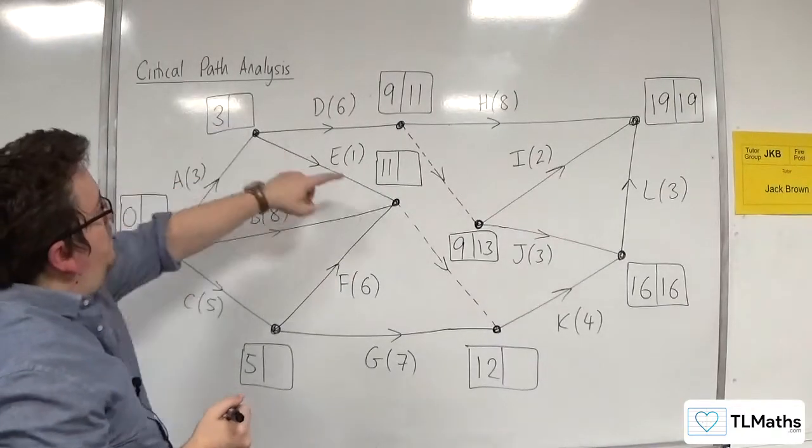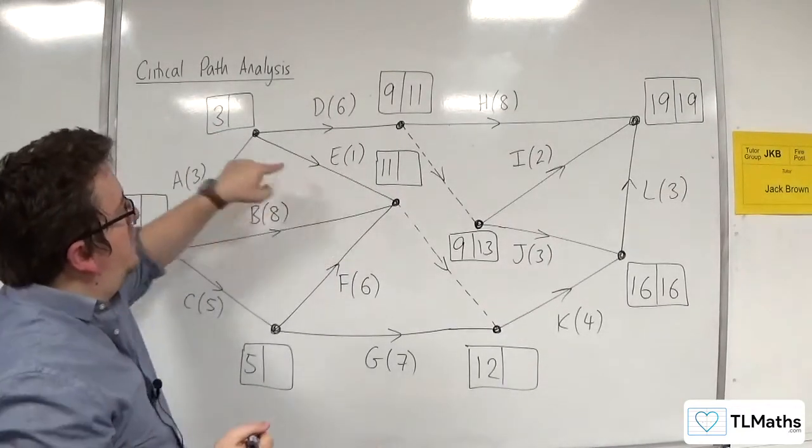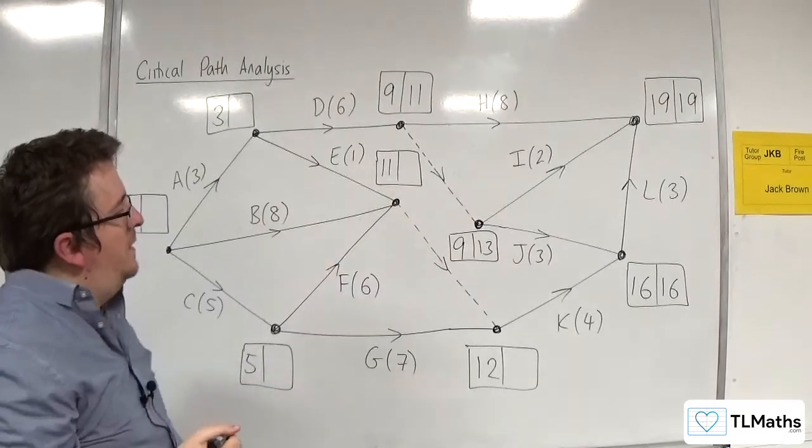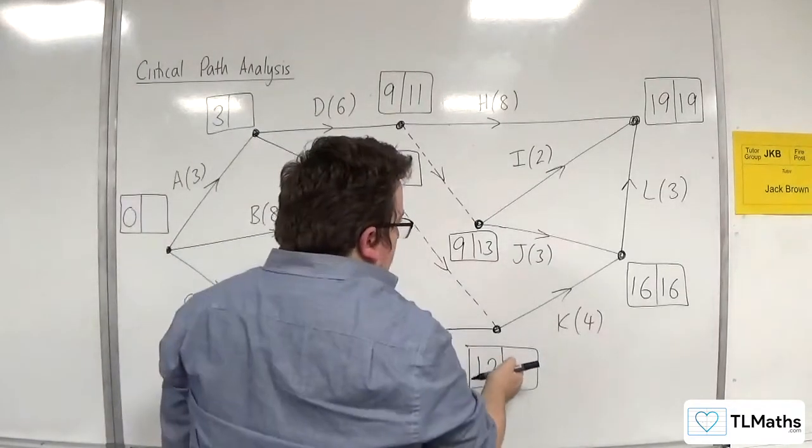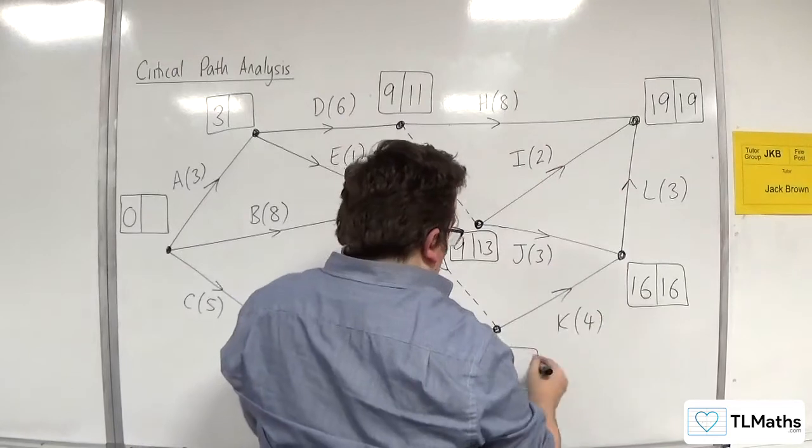Now we can't do this one because there's another route back, and we don't know what that value is there. So I'm going to have to go down here now. 16 take away 4 is 12.